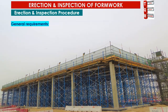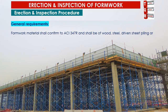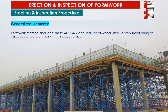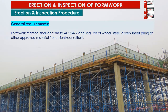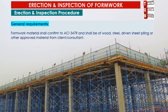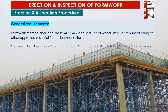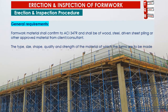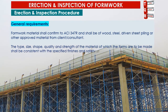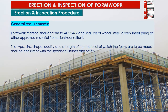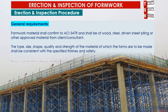Formwork material shall conform to ACI 347R and shall be of wood, steel, driven sheet piling, or other materials approved by the client or consultant. The type, size, shape, quality, and strength of the material of which the forms are made shall be consistent with the specified finishes and safety.